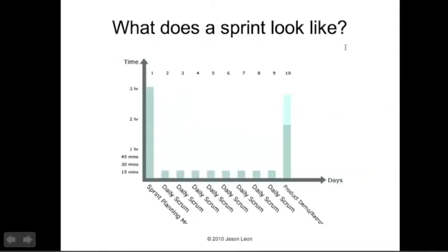This is a graph that basically shows what I just described. The sprint planning meeting up front, you can do those in 3 hours or less. When you're really moving, like halfway through your product development cycle, I'd say you're getting those things done in an hour, 2 hours if it's a really in-depth component that needs a lot of thinking. But that's it, and then you're off. You're off to finish the project, to get to your next retrospective or the product demo.